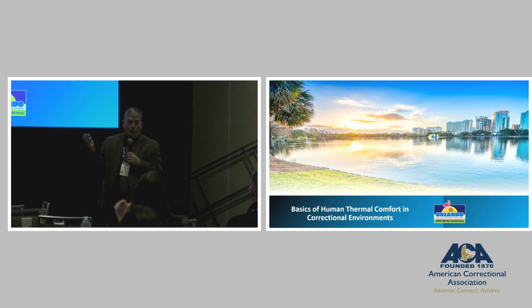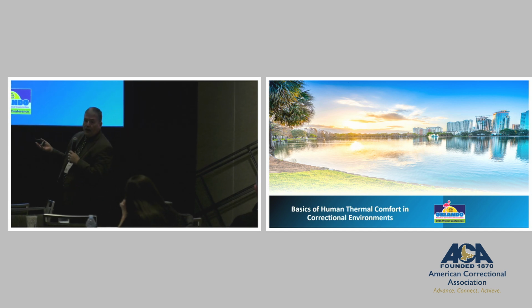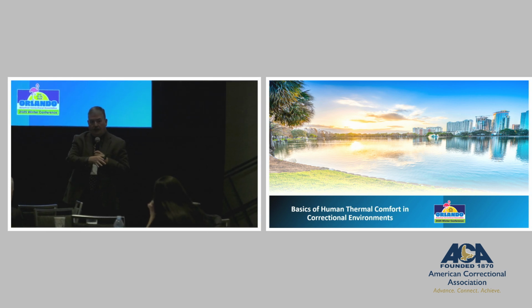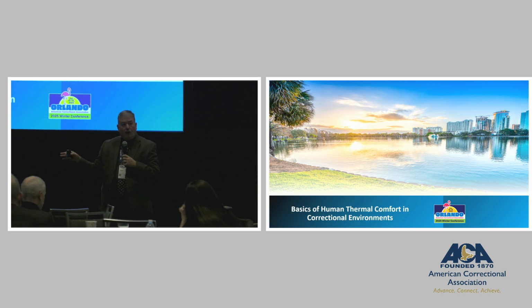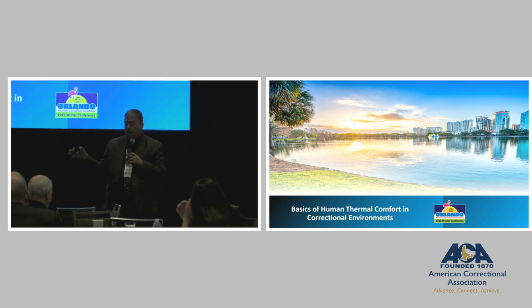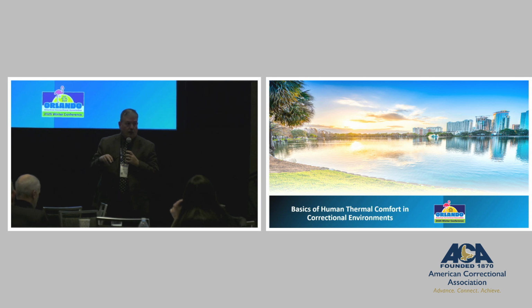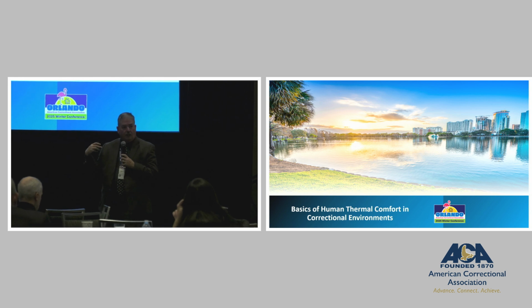The contractor looked at our schedule and said, we can't do this. So they moved all the juveniles into the Band-Aid facility, and then they were able to go without phase construction in the facility that was being renovated. That made the whole process possible. So there is the possibility of short-circuiting what Brad is talking about being required, maybe, in certain circumstances.